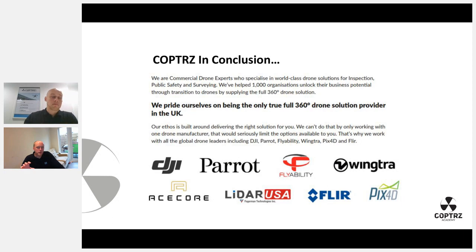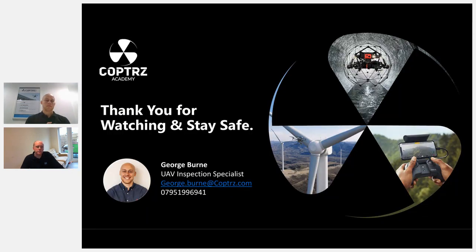Yeah, so fortunately we've got a couple of different things. We've got our GIS system, which gives us all the land we own. There are often large areas along the route which we own, which is great. For other areas, we use our land access agents. They'll come back and tell us who the owner is and help us arrange permissions to fly across their land, or take off from their land and carry out the inspection. We try to be as open as possible. If we are flying near perhaps a farm along the route, we'll go and let them know and make sure people are aware of what we're doing. Either we'll send out messages or mails to people, or the land agent will arrange access to that particular site for us so we can fly from there.